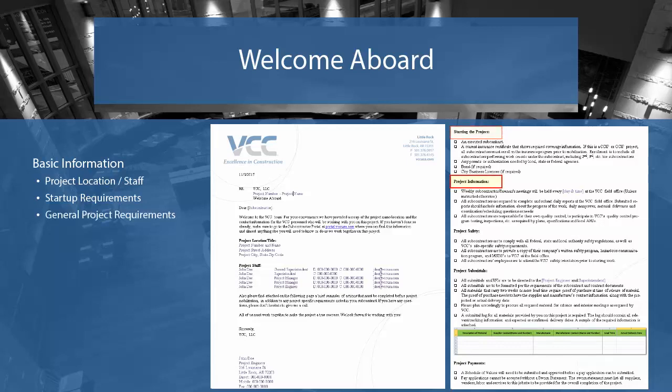The letter also serves as a means of informing each subcontractor of contractual obligations and insurance requirements. Project engineers will email this letter to all subcontractors, after they have been awarded a contract for a project. Each letter must be completed in its entirety. The template for the most up-to-date letter can be found in the Project Engineer Resources folder on the N drive.